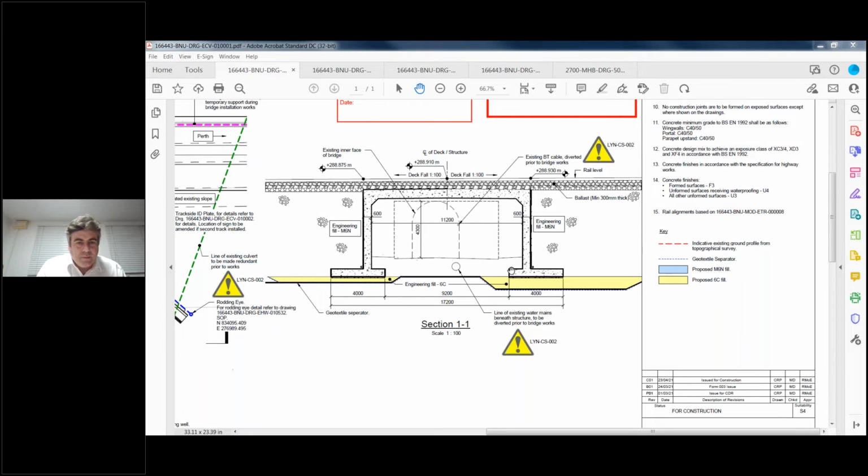Robert, it's Callum here, the site engineer that was on the job. I can run through a quick brief of what we did on site during the dig. We had geotechnical engineers from Arup on call for the duration of the weekend. They came up and we excavated down. We thought we were going to encounter some peat in some areas going by the SI, so we brought in an additional 1,000 tonne of 6C material just to cover ourselves. But as it happened, we dug down and found minimal peat. The geotechnical engineers assessed the formation and said that was okay, that's as deep as we had to go. I can't remember what the actual final depth was. I think it was 1 metre in some places and 600 everywhere else.